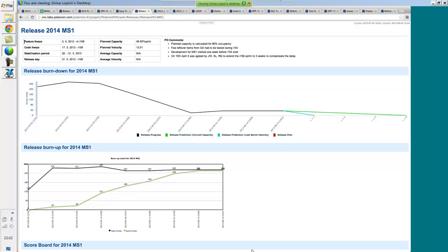And to the grooming, as you can see, there are some important items that were dropped off the paper because of the scope changes. The time points for us, we do this counting of the sprints. So just to give you an idea, we're currently at sprint 183. Some sprints are shorter or longer, and this is mainly related to statutory holidays or Christmas, or to adjust to finish, for instance, a sprint at the release.